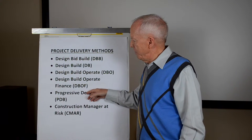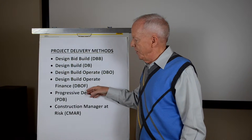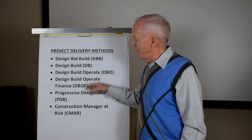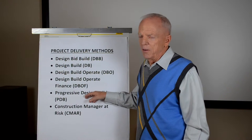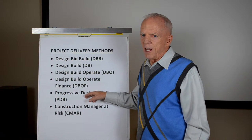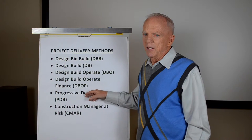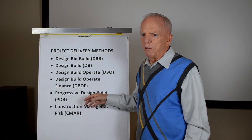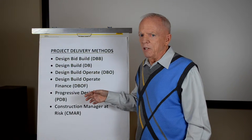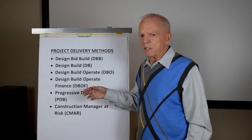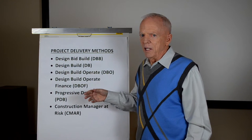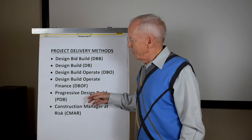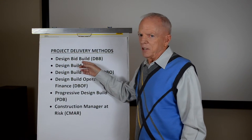Progressive design-build is a little different than design-build. In this case, the owner makes the selection not based on competitive design, but based on qualifications. The single entity then develops the design to about the 60% level, and then they produce a guaranteed maximum price. Assuming that can be negotiated with the owner, the project continues down that path. If they can't agree on the price, there's an off-ramp where the project is finished using conventional design-bid-build.